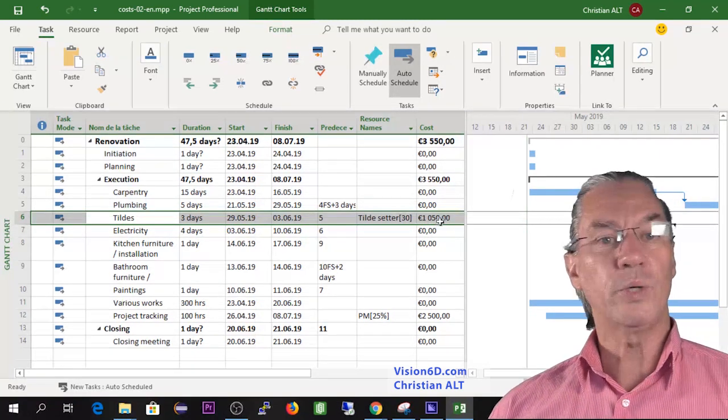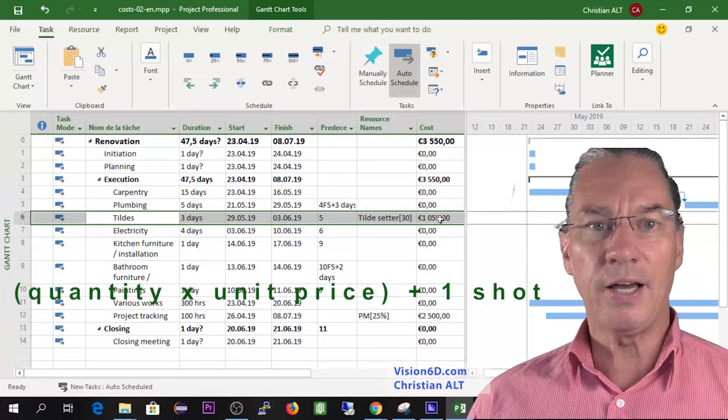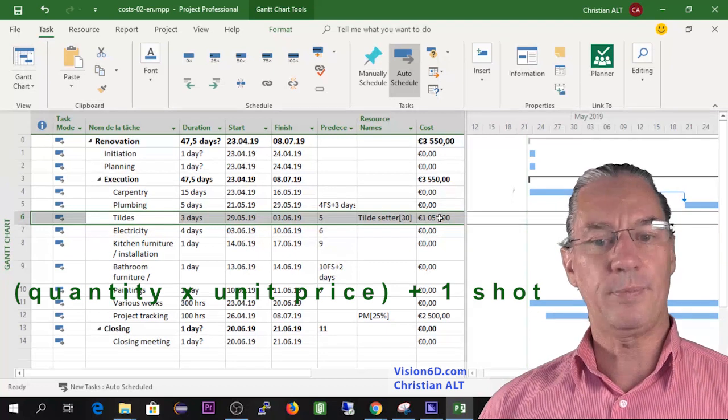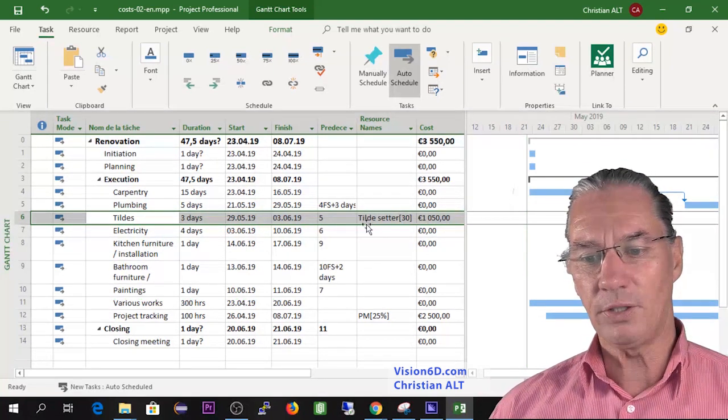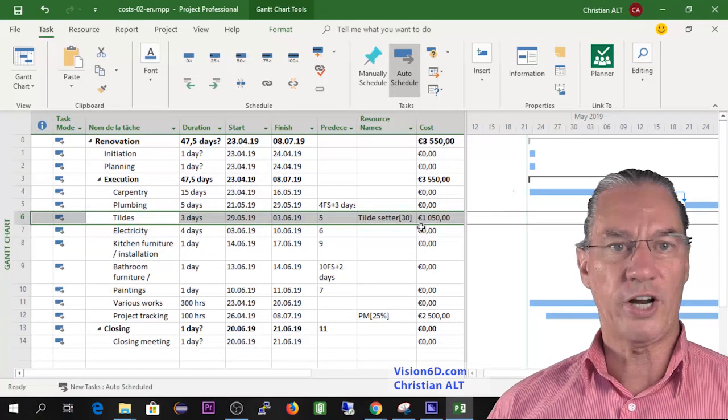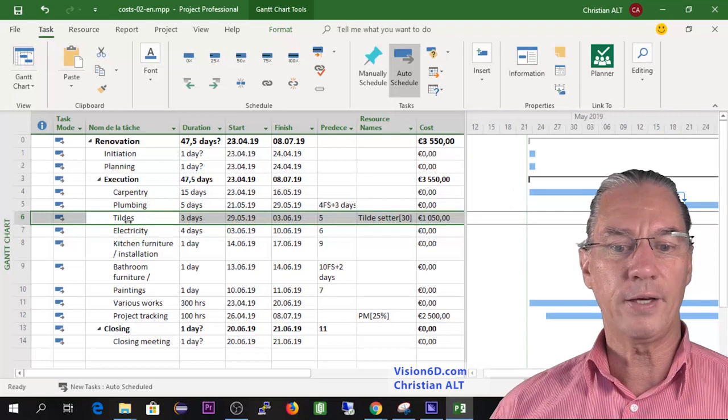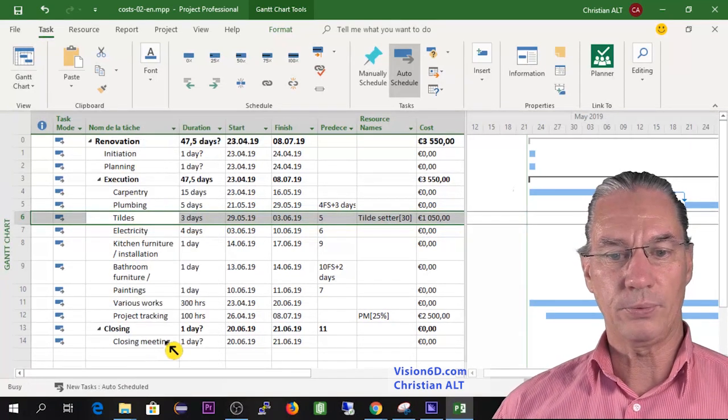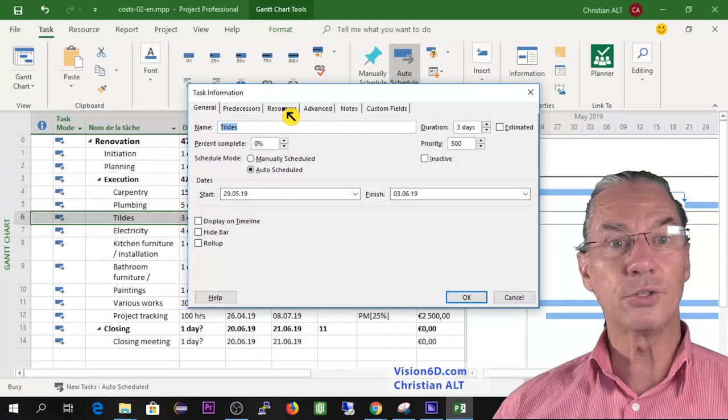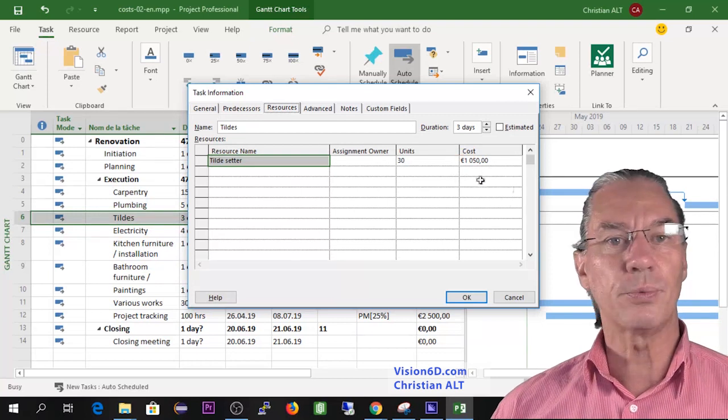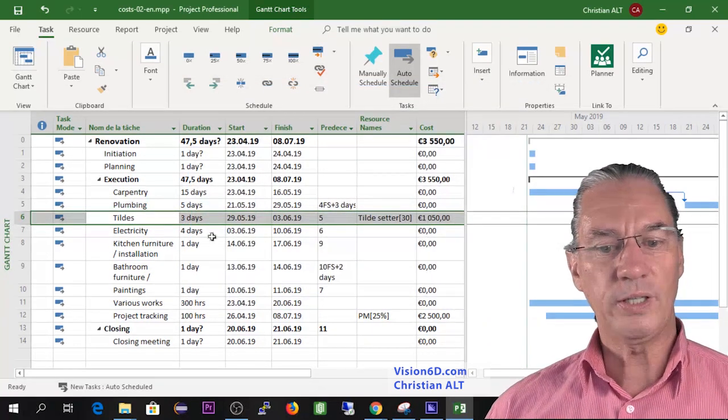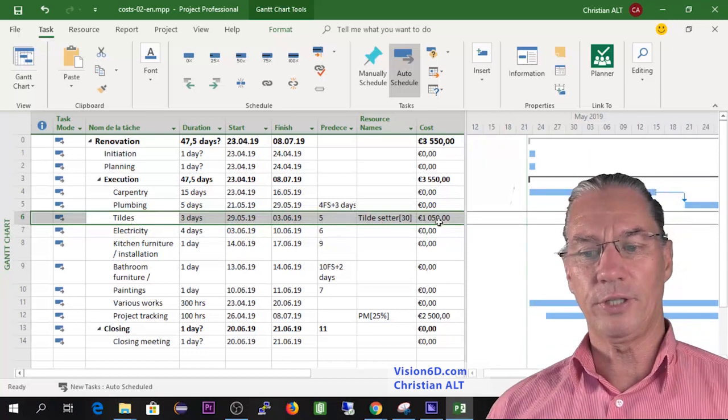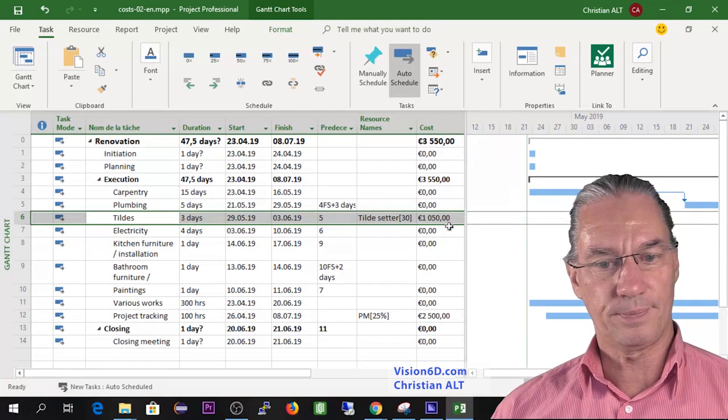30 square meters times 30 is 900 euros, then you have those 150 which is for the basement, so we are set with the tile setters. I think you understood now how the kind of resource which is of type material is costed. You see here the tile setter has in square brackets the number of units. The cost has also been adapted. The tile setters are going to cost us 1050 euros in this project.